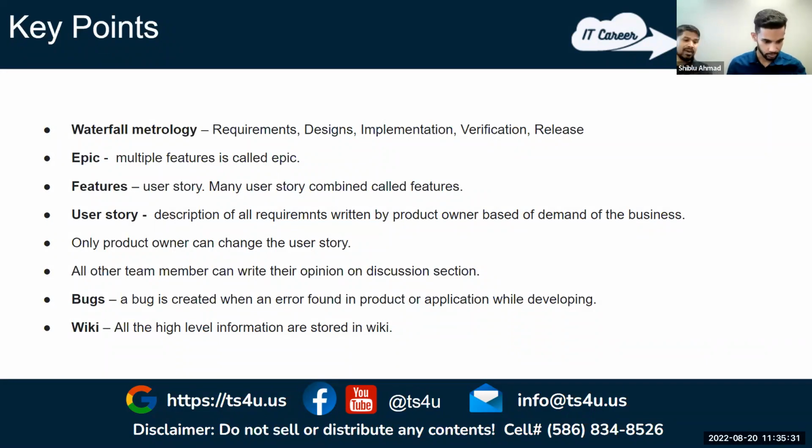But you did not say what the user story is. You have to say a small functionality that a team can build in one, two, or three days. That's called the user story. So what's the difference between user story and feature? A feature can take many days. Many user stories make up a feature. Exactly, that's what I said.